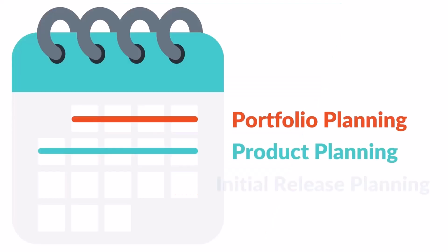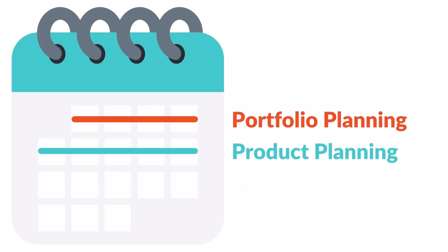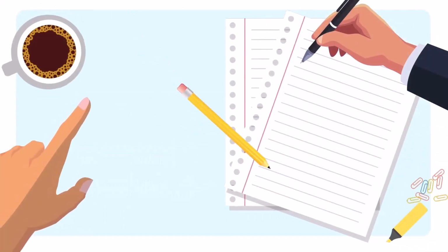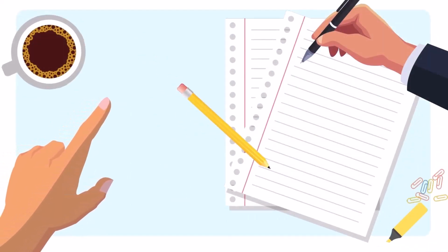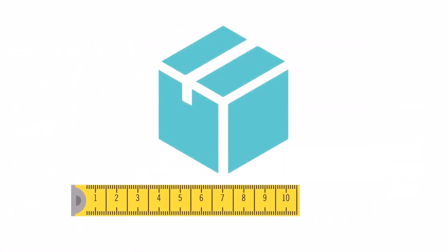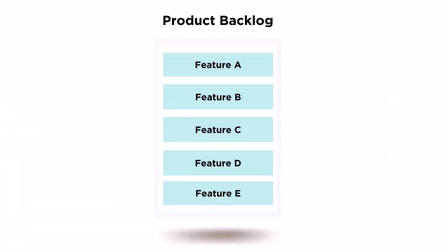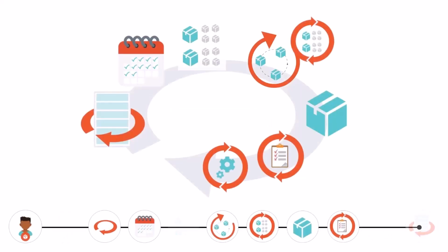In week 3, the product owner is engaged in initial release planning. This typically involves a product backlog item writing workshop to generate a high-level product backlog that can be used during release planning. Following, the product owner participates in an estimating workshop to estimate the size of high-value product backlog items. Next, the product owner facilitates an initial release planning session to prioritize the product backlog and balance the constraints of scope, schedule, and budget. Following release planning, the Scrum team performs the first sprint.